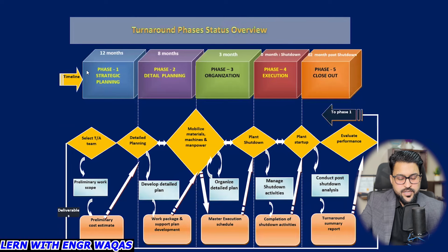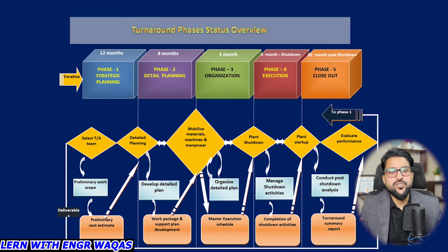So that is the 1 year strategy I'm going to share with you, from asset management, from 25 years to 5 years to 1 year. So this is 1 year. Before starting any shutdown or turnaround, it is very important to understand the cutoff dates, when you are going to set the threshold lines with your departments to synchronize your scope of work. It's very important to know which valve was mentioned as a work order.